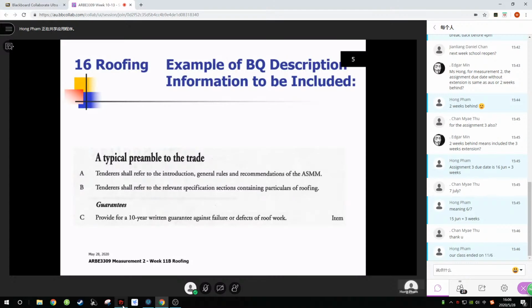For this kind of guarantee in Singapore, for a metal roof, usually we also give a 10 year guarantee. For waterproofing, it depends. For the roof, maybe we give up to 5 years. About 5 years guarantee for waterproofing, 5 or 10 years, I can't remember. As he said, the warranty is only for the waterproofing membrane. So if you put something on it, you need to get your own contractor to remove it and put it back. But they will give you the membrane for free.